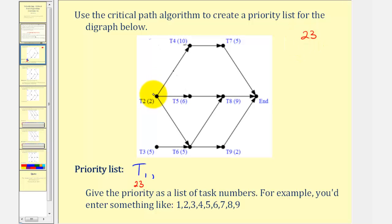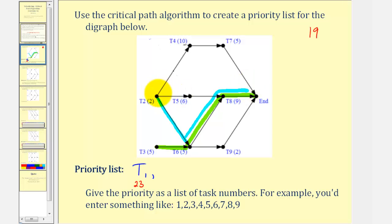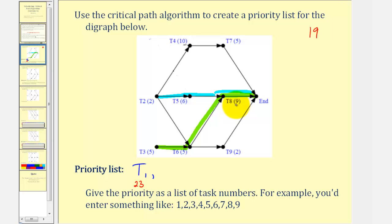Now the critical path would have to start from task two or task three. The path from task three to six to eight to the end had a total time of five plus five plus nine, or nineteen hours. From three to six to nine to the end has a total time of twelve hours. From task two to six to eight to the end would have a total time of two plus five plus nine — that's sixteen, less than nineteen. From two to five to eight to the end has a total time of two plus six plus nine, or seventeen — still less than nineteen.